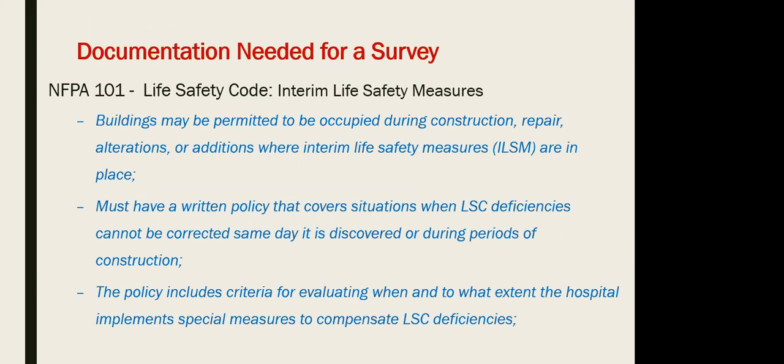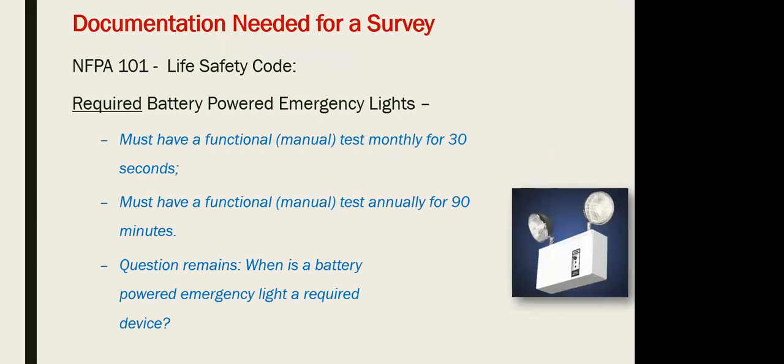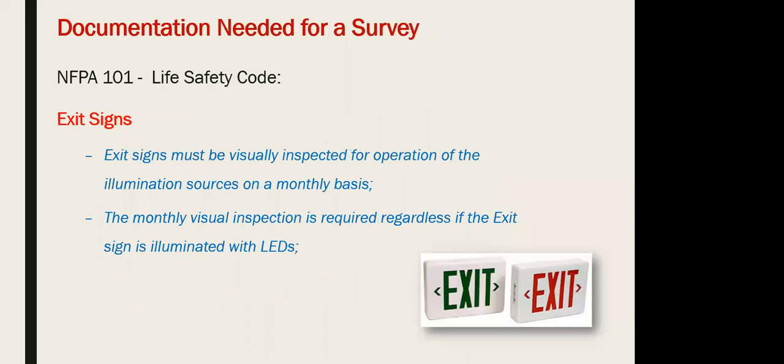Documentation for the life safety: providing the layout plans for the life safety plans and calculations for the hazard traveling distance. Documentation for the doors, equipment, and all materials of the wall painting, the ceilings, the emergency lighting, certificates, etc. Providing the exit signs and the documentation recording the tests themselves.